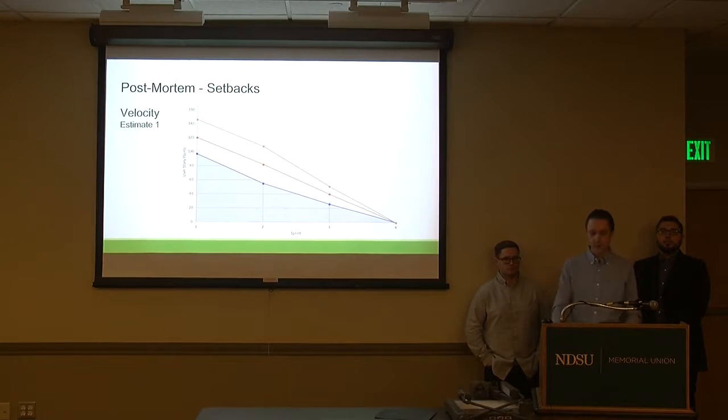This is just a quick burn down chart of what we had originally anticipated the project would take as far as effort and when we'd get everything done. And you can see that over time, we just added more and more effort to the project to tackle some of these setbacks we had without John Deere adding any particular new user stories.